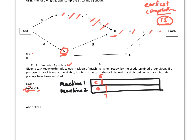So then I have A next. A I want to schedule as soon as I can, so I'm going to put that right after, so I can sneak that A in there on that first machine. Now I go to my next one which would be my B. Well now it's a choice, but I'm going to go to the first machine to put on my B. My B is four units length, so I'm going to put my B here. So now I'm up to 11 on that side, that machine, and then my next one is going to be D.